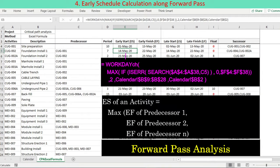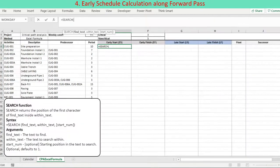Early schedule is calculated along the forward pass starting from the project's start activity. An activity is allowed to start only after all predecessors of the activity are finished. In other words, the start date is calculated as the latest — maximum — finish date of its predecessors. The early start date, abbreviated as ES, is translated into an Excel formula using the Excel MAX function: ES equals MAX of finish dates of predecessors. The Excel SEARCH function is used to find every predecessor of an activity.